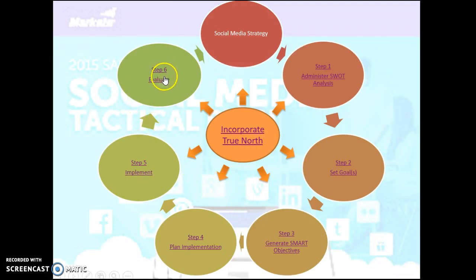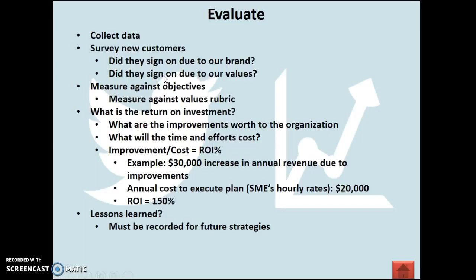Next, we're going to go to Evaluate. When we evaluate, we collect the data, survey the customers or audience, measure the data against the objectives, and calculate the return on investment. Then we're going to log our lessons learned and save them for future strategies.